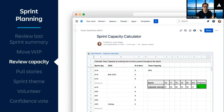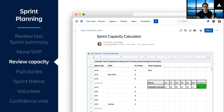Then we take the average of the last five sprints' velocity and adjust it according to the expected capacity. This gives us a projection of how many points worth of work we think we can accomplish in the next sprint cycle. This method of capacity planning assumes that your team has a stable velocity, meaning you've had the same team members together for at least the last three sprints.